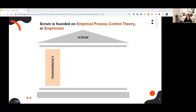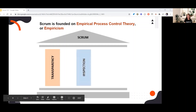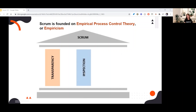The first pillar is transparency. In order for team members to feel responsible for the overall result, they need to know the essentials of the process and be regularly informed. For example, in the Daily Stand-up Meeting (DSM), everyone on the team must update the progress of their task and share any blockers or impediments so that everyone knows what's going on. The second pillar is inspection — timely checks on progress toward a sprint goal to detect undesirable variances. For example, you can check the Scrum board to see whether the team is delayed due to a blocker or still on track.